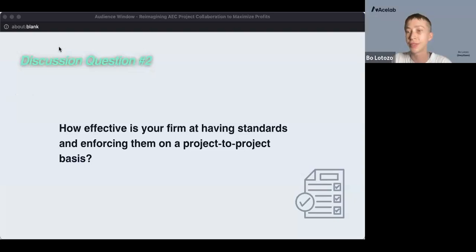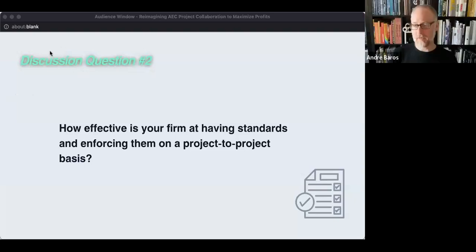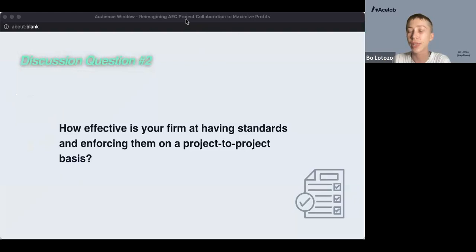Yeah. Of the 5 firms I've worked at, I saw one that was really good at saying this: every project follows the standards. You start there, but then afterward you assess, where did you deviate, and was it because of a project specific requirement, or is it because you found something better and we need to update our standards? And the standards were a living document. Every time a project closed out, that standard was updated, maybe only a little bit, but it was a fully living document. Mm-hmm. Yeah, I like that term, a living document.